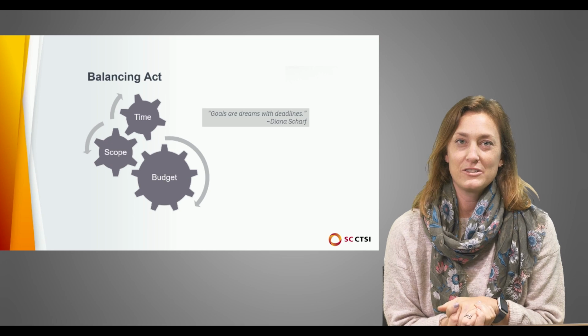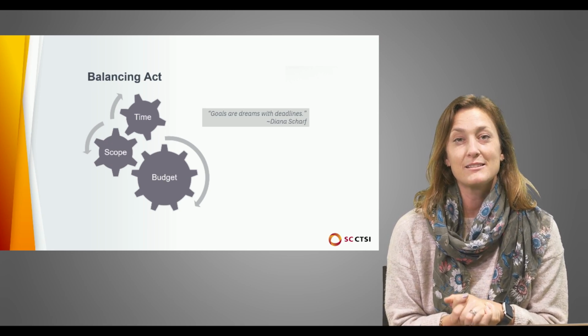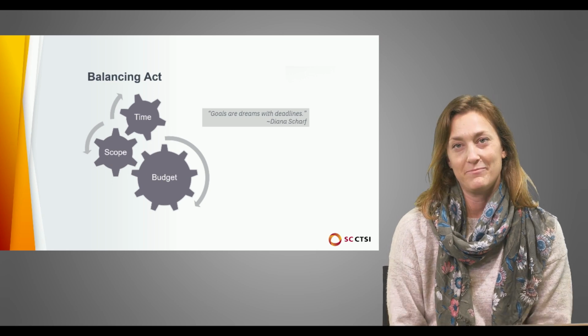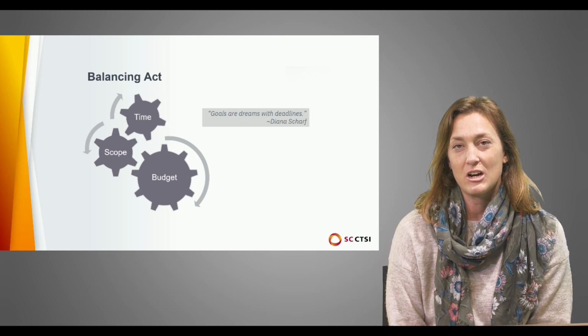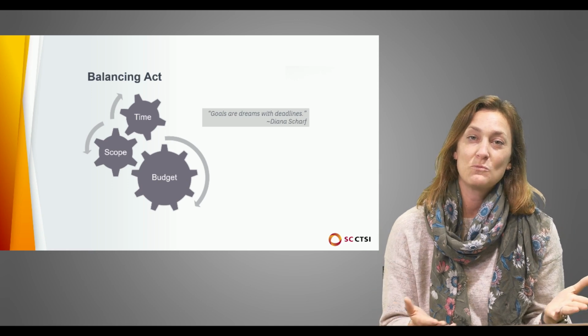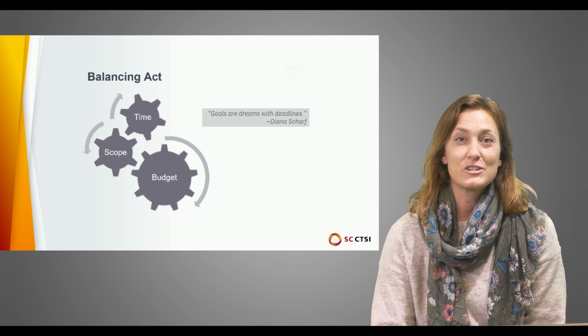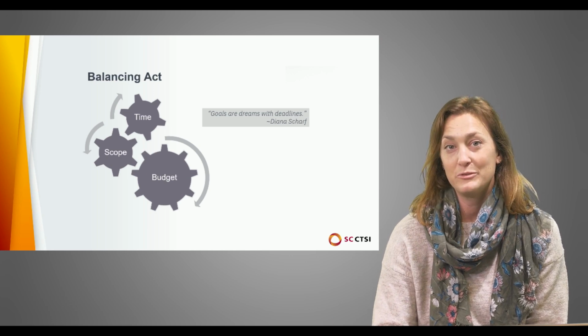The big 3 factors that you constantly need to juggle during any project are timelines, scope or scale, and money. A change in one factor can cause an opposite reaction in another. For example, if you end up spending more than expected in one area, you might have to sacrifice elsewhere. Or if your timeline is cut short, you might need to spend more money to deliver on time.